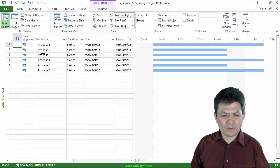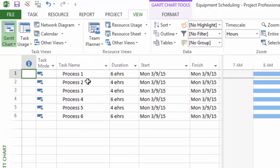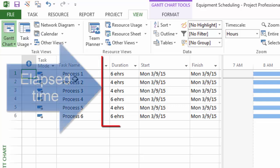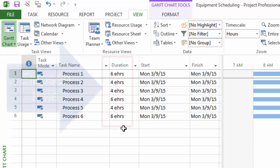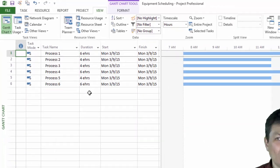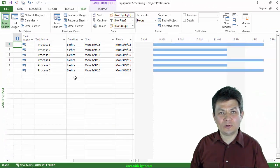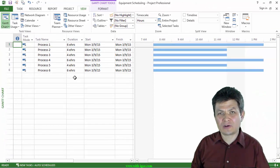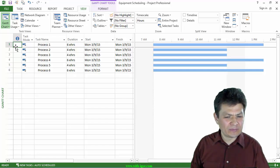So the first thing that I did here is I specified durations for these tasks to be in elapsed hours. Notice that in the durations column I have EHRS rather than HRS. Elapsed hours will overwrite or ignore the calendar and it will give you the straight six or four hours.